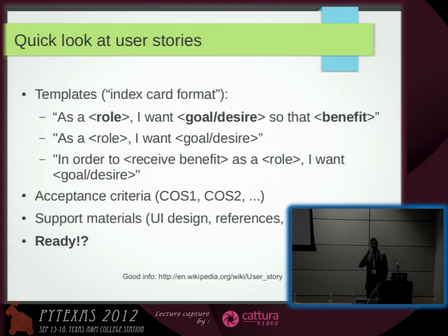So to go back to that example of the document management system, if I just put a user story in front of the team and say, okay, guys, implement the document management system, we would go nowhere. So I will talk to the client and then maybe itemize what they mean by that, and maybe come back to you guys and say, I really have like 15 user stories, and each of these, in my opinion, can be done within 1 or 2 sprints. Can you help me out, do the estimate of the work?